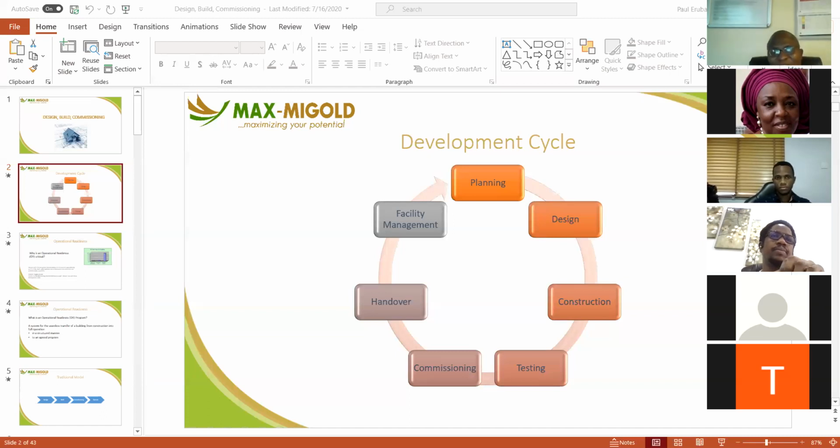You mentioned three kinds of documents: the construction drawing, the as-built, and the design drawing. Yes. The design drawing is what you generate from the brief. The construction drawing is all those blow-ups to show work methods and materials to be used for different processes during construction. The as-built drawing is not related to these two sets of drawings. It is a fresh set of drawings that is measured and drawn.